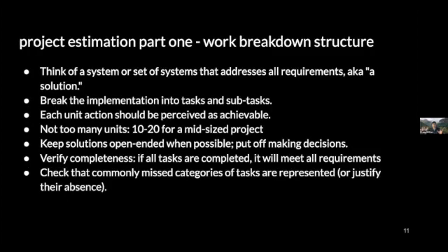So having done all that, I've raced you through like a full semester of systems engineering and project management coursework. We're going to get to the estimation method. Like I said, this is a method called decomposition. The idea is that you break the big project into smaller projects. Each small project or task or subtask should be something that you can conceive of doing, or whoever will be doing the work can conceive of doing. It's not important at this point that you know how to do it.